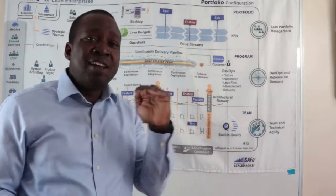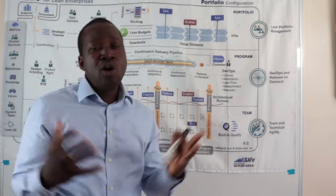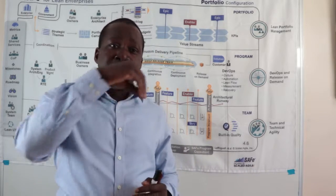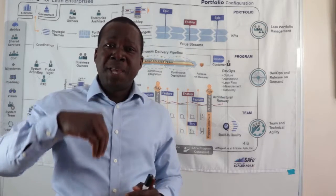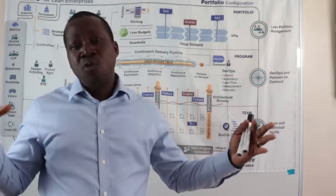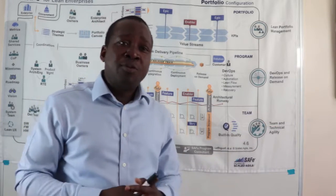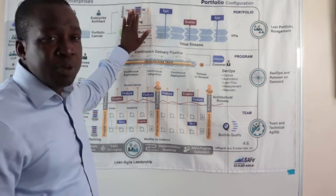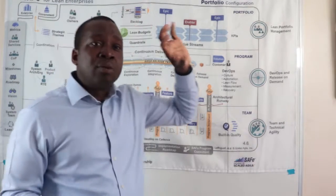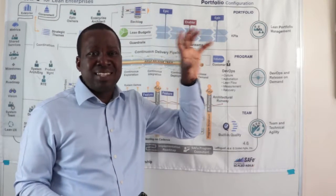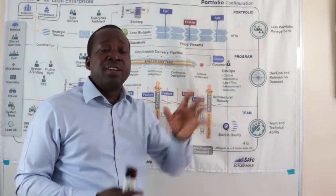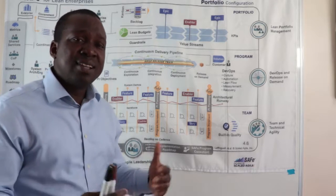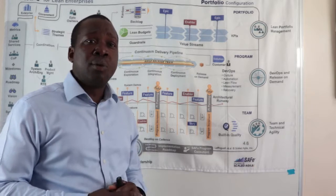Our value streams deliver value to the customer, and we need to take an overall look at our organization and draw out our key value streams and see how the business, systems, people and processes help deliver overall value to the customer. If we have a good understanding of our portfolio, we are able to create our portfolio Kanban — key projects, key product deliveries or initiatives that should be delivered over a particular period. We are able to assign a budget and then create a lean business case to sign off our initiatives.